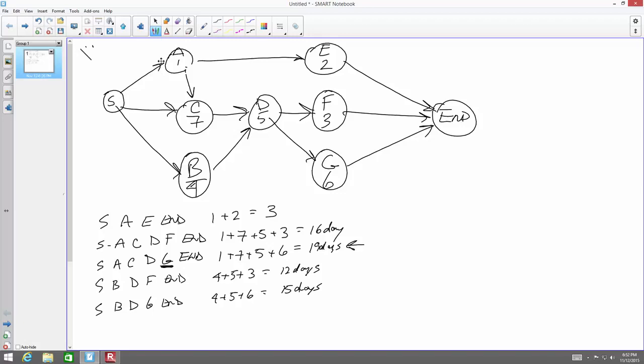In this particular scenario, the contractor is going to receive a one-time lump sum savings or bonus for coming up with this alternative. You're not going to go into a long-term contractual relationship over the life of the project. Even the maintenance may be saved over time, but it gives the engineer the opportunity to get some return for a good idea.